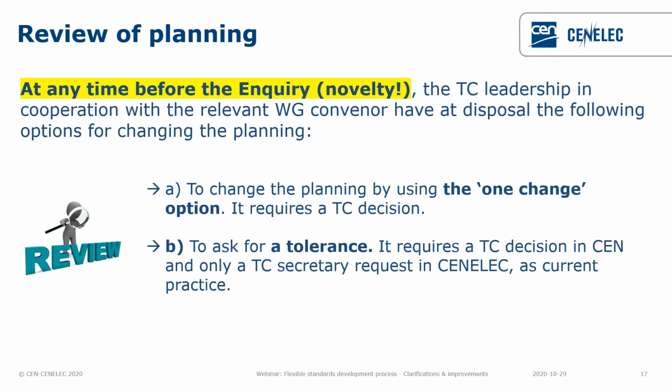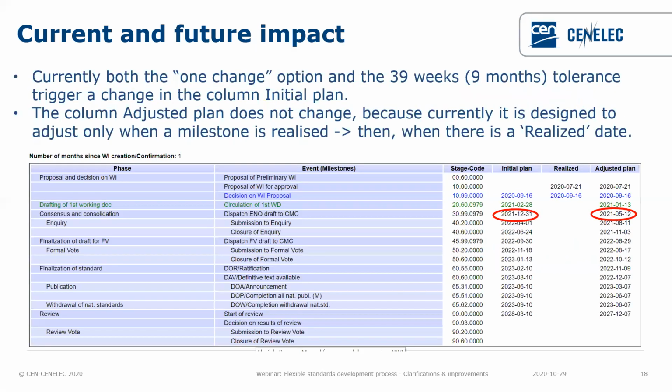So this is the change: technical bodies can introduce this kind of request at any time in the process before the start of the public inquiry.